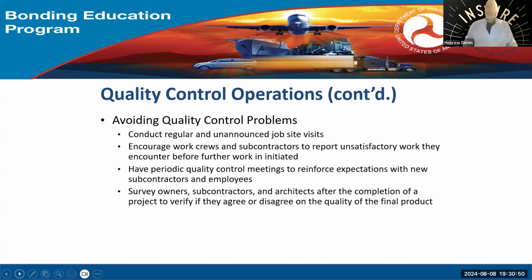They will not do that at all, because what does that mean? They hold that money. They want to hold that money as long as possible. So make sure you do that, and make sure you do it at 49%. You should be putting the paperwork in, because 50% is coming soon. Next slide, Ms. Bell.